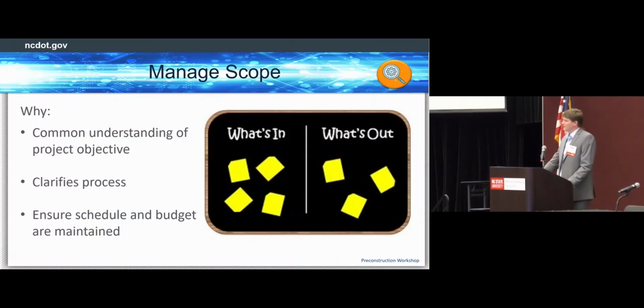Project scoping. We as project managers bring clarity to the project team through a well-defined scope. And as we begin projects, we may not have full clarity. Ideally, we can't say that we know exactly what we're going to need to deliver on day one. But we begin with the information we have, and we refine that as we continue on. We need to identify the activities and deliverables necessary with the help of our project team members. I'm hopeful that the interactive PDN is providing another tool, another resource to help with this. If activities identified in the PDN are not necessary, we don't need to scope them. We need to remove those from the template in the MS Project schedule.